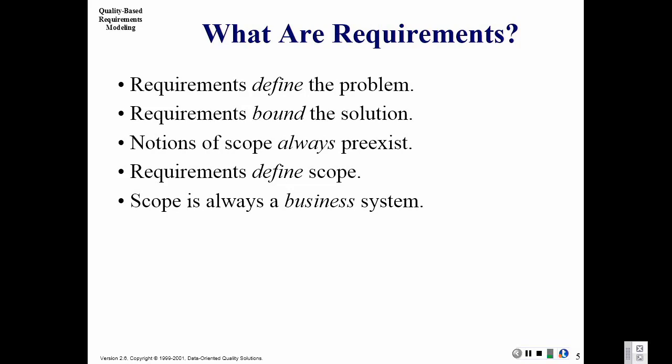There's a constant friction: to write a good requirement you don't want to embed the solution, yet as we move down in detail we do need to embed knowledge of the solution space in the language of our requirement without dictating what the solution is. Sometimes you get bad requirements documents because they're too high-level and don't provide enough guidance. But many requirements documents go too detailed and actually constrain — and if you're in a contract-dictated environment, nothing is more dangerous than a requirements definition that's too detailed. Analysts who write requirements often came up from coding five or ten years ago, and they embed obsolete technologies as requirements.